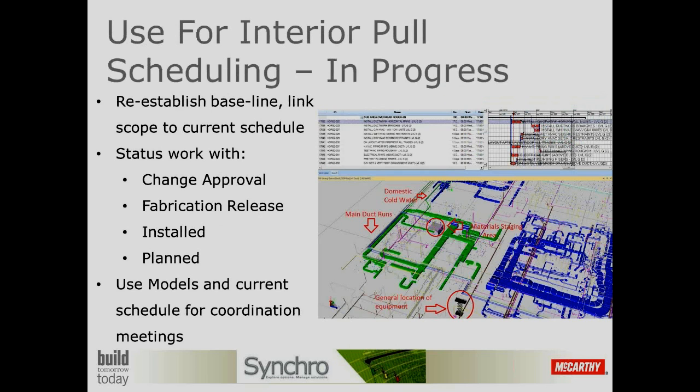What we wanted to do is get back to using the models during our Subtrade coordination meeting. On a weekly basis, everything is on a weekly cycle from the P3 updates, our full scheduling, location-based scheduling, everything on our project. So we wanted to be able to take these models, bring them back into the Subtrade coordination meetings, and use those during the full schedule meetings.